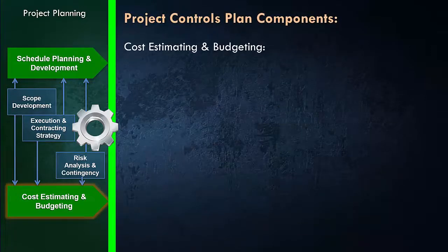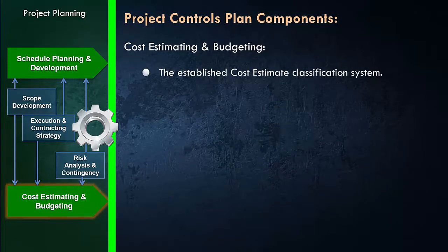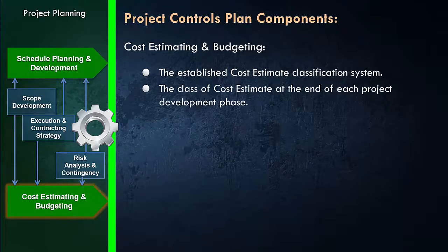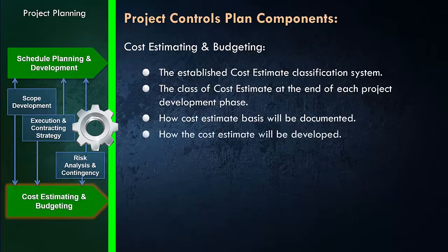When it comes to cost estimating and budgeting, you need to mention the established cost estimate classification system, what kind of classification system you're going to use for your cost estimate. Also, what class of the cost estimate you are going to develop at the end of each project development phase, and how the cost estimate basis will be documented, and how the cost estimate will be developed.